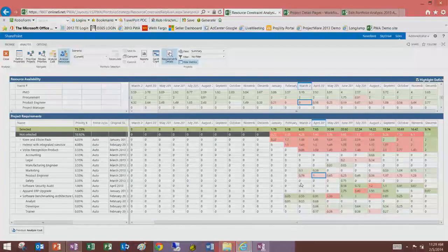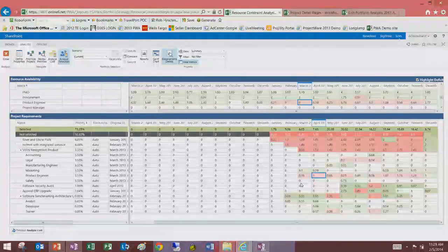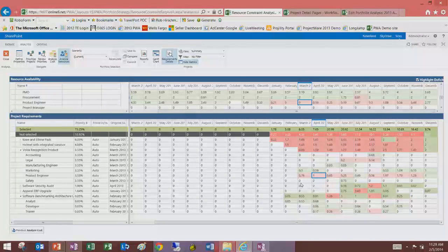You had to select all of the projects. Yeah, if you want a full picture of the whole portfolio, that's correct, current and pipeline. Every project needs to be in that portfolio. And in reality, some may be beyond this life cycle phase. You've already chosen them, but you still want to put them in that portfolio analysis. Yeah, that's a good point. If you just want to run a cost analysis, maybe you could only select proposals, because in that situation, cost is more important for proposals. But as soon as you touch resources, obviously you have to take into account in-flight projects.